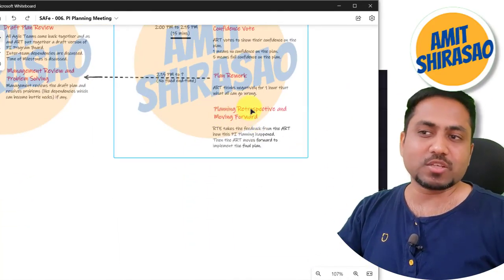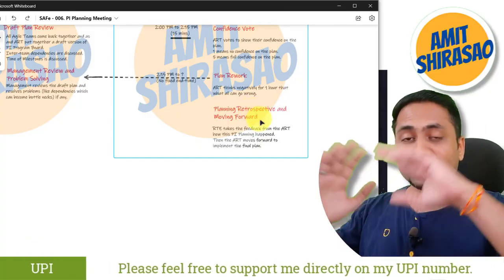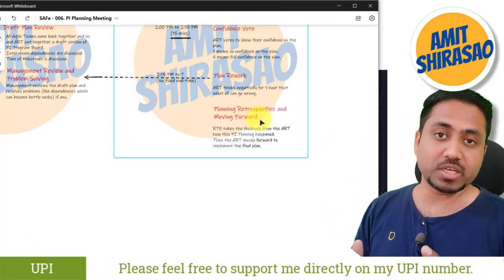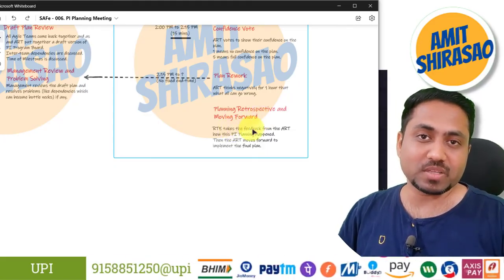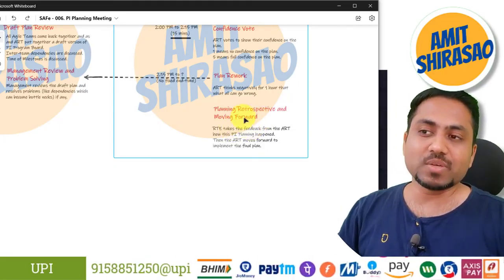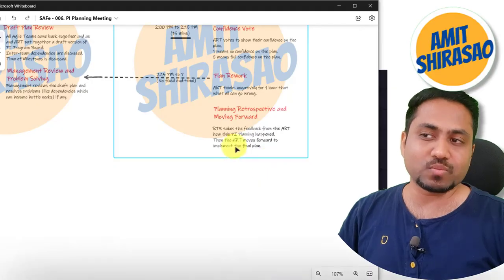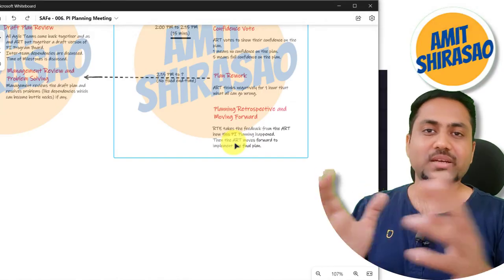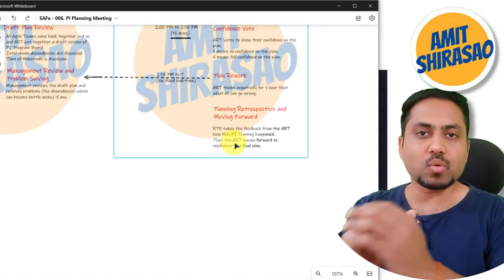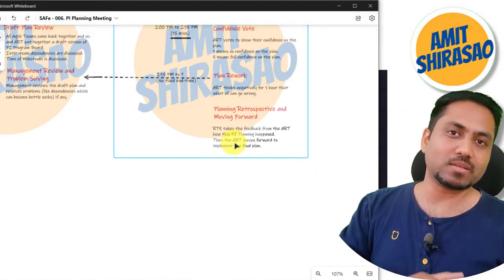So planning retrospective means what? Even this planning meeting is huge, right? It takes 2 days and all this. So even here there can be some feedback that should be taken, right? This planning meeting was organized by whom? It was organized by the RTE. So the RTE takes the feedback from the entire ART. Okay, what went well, what did not go well, and what can be done better the next time.